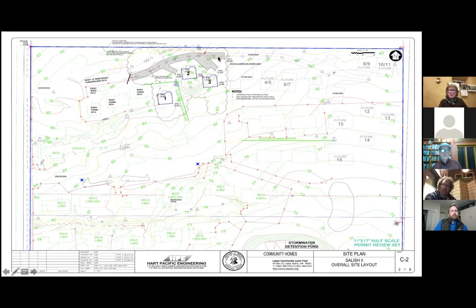But in this instance, we played around with the size of the buildings, the amount of impervious driveway we were going to add, the number of parking spaces, and the clearing on there. We played around with all of it until we knew that we could keep it under 5,000 square feet. And again, that saved us a tremendous amount of development costs. And so I'm not saying that that is our only influencer, right?